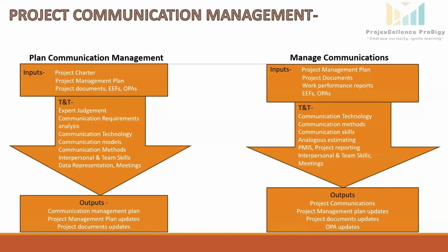It's push communication. Pull communication: stakeholders access information on demand via portals, intranet, knowledge repositories, and databases. So uploading design documents on a shared portal for engineers to access when needed is pull communication.